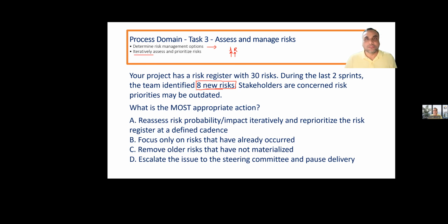In the planning meeting, we discuss and evaluate the work. In the review meeting, we demonstrate the work to collect feedback. In the daily stand-up meeting, we identify the impediments, obstacles, or blockers. And in the retrospective, we discuss what went wrong, what new we can do to improve, and what went well, we should continue doing. So it can never be in the review meeting.